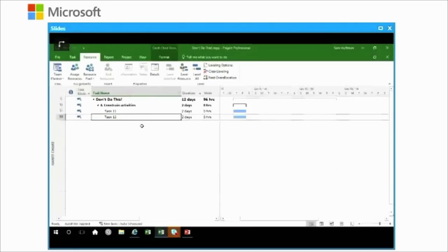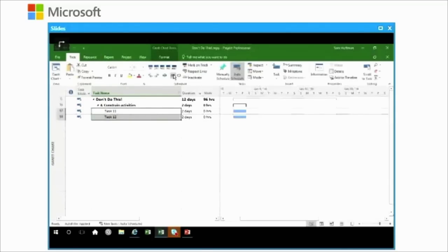Here we go. Now, in this example, I'm going to link tasks, and we'll look at some of those dynamic properties. Once a task is linked, one task will drive another. So these two tasks are a very typical sequence in MS Project. Task 11 is called the predecessor. Doesn't mean precede. It means it's driving another task. In this case, the finish of the predecessor is driving the start of what's called the successor. That's the task receiving that date. And as we've already seen, tasks can be concurrent, they can overlap. There's a number of strategies that you can incorporate to create sequencing twists and turns and as dynamic as you wish it to be, provided you keep constraints out of your schedule as much as possible.